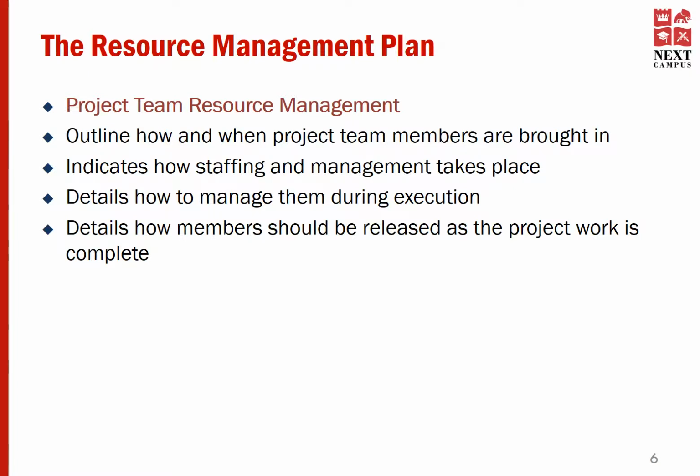We should consider how project team resources will be managed as well. This will outline how and when team members are brought into the project and indicate how staffing and management activities should take place. Further, this should include details on how members should be released once their work is complete. Will the team members work on any other projects other than the current project? This is a valid question you may ask your project team. If so, necessary allocation has to be adjusted to match the capacity.